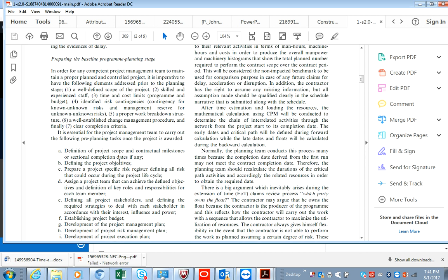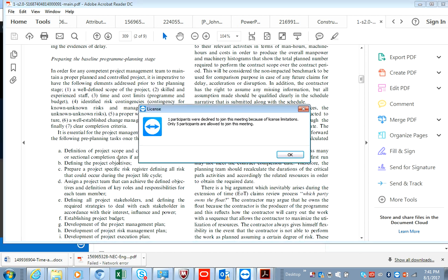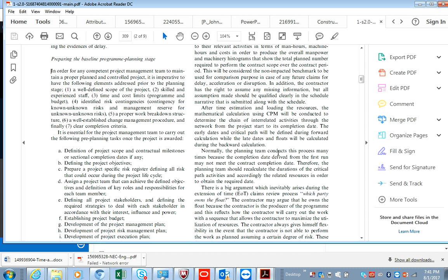Do you understand? Communications room. You want to obviously get the comms room completed before a particular time. Or you want to get the lobby area, if it's a commercial building, put through at a certain time. Or you want to hand over 10 apartments at a go every week for the next 10 weeks till it completes the whole 100 and whatever number of apartments it is.